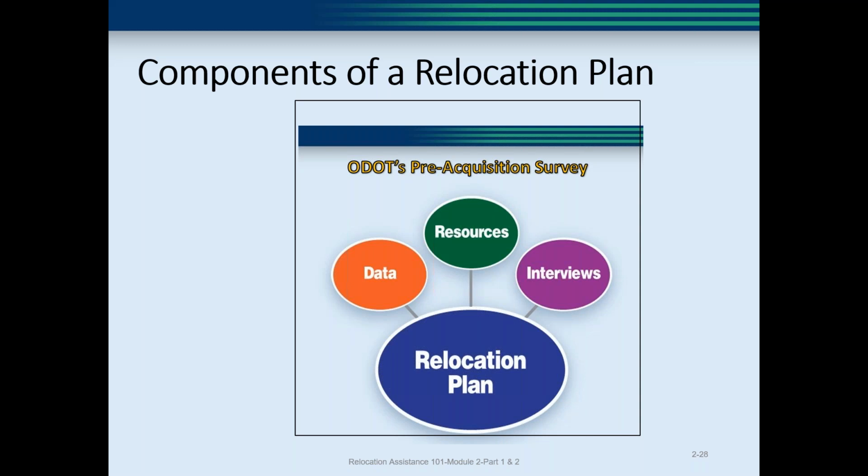And if you ever have a bar restaurant that you need to relocate, or any type of business with a liquor license, that's always a challenge. Also with the bar restaurant, you've got to consider distances to schools and churches for a relocation site. The agencies must identify the efforts necessary to provide housing of last resort.